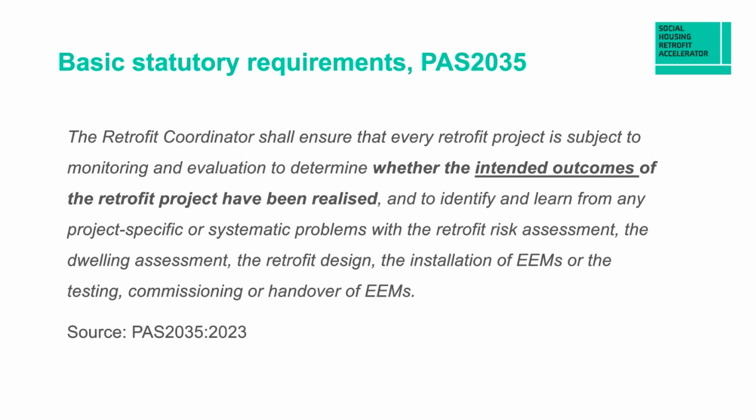The dwelling assessments have often been of varying quality. So sometimes you'll get an inappropriate dwelling assessment because people haven't checked the housing type, and you might have a wrong wall type. If that's the case and no one goes back and checks it, you could end up having an incorrect retrofit design. Hopefully most of the retrofit designs are focused on properties that need some more significant elements rather than more simple measures like loft and cavity wall insulation. Also, retrofit design didn't really exist outside of suppliers and contractors for many mass, at scale retrofit projects until the introduction of PAS.